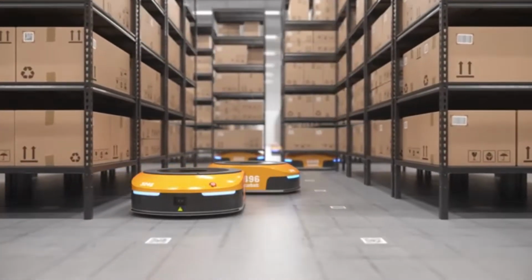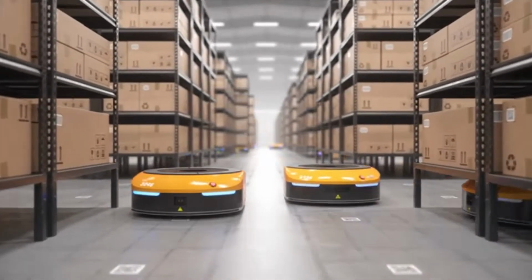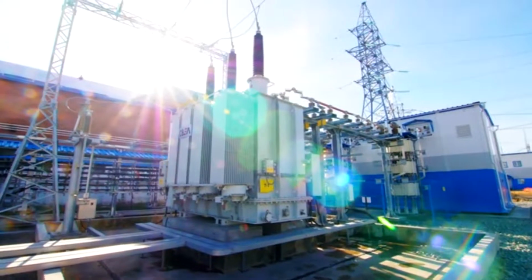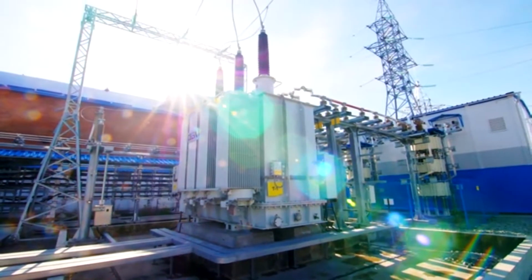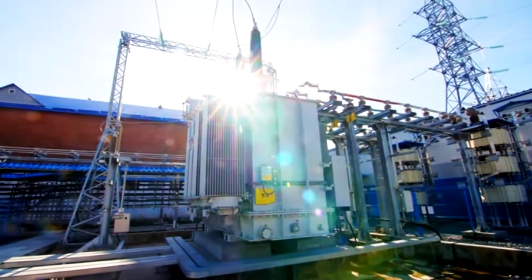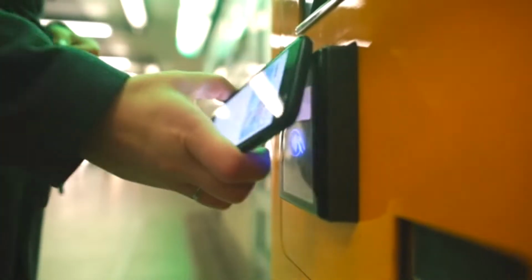The business case is created as a result of the following. Market demand, for example, an automobile manufacturer authorizing a project to build more fuel-efficient cars in response to gasoline shortages. Organizational need, for example, due to high overhead costs, a company may combine staff functions and streamline processes to reduce costs. Customer request, for example, an electric utility authorizing a project to build a new substation to serve a new industrial park. Technological advance, for example, an airline authorizing a new project to develop electronic tickets instead of paper tickets based on technological advances.